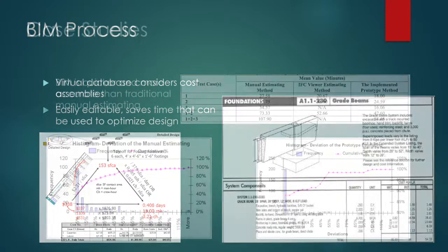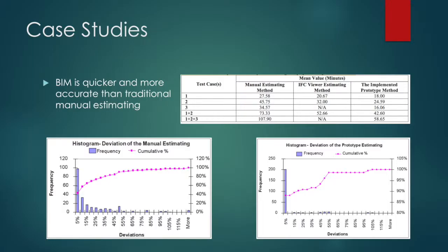A case study found that detailed cost estimating with BIM is up to 65% more efficient and also leads to a more accurate cost estimate. This shows that using building information modeling is worth the initial investment because it has the potential to not only match manual estimating but also outperform manual cost estimating in all categories surveyed. The ability to perform estimates at a quicker rate allows firms to potentially estimate more projects at once and expand and grow their business. This can be huge for small firms looking to create a larger foothold within the industry.